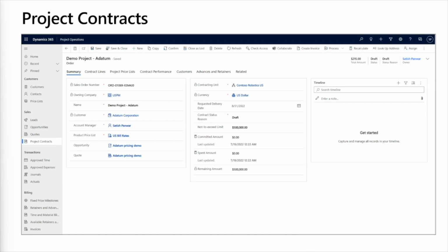A contract line also helps identify and estimate the work for each high-level component. The estimate includes the schedule and the financial aspects for the work tied to that contract line. Contracting models and chargeable components are set up for each contract line, which holds the billing arrangement for each contract line and the overall contract.